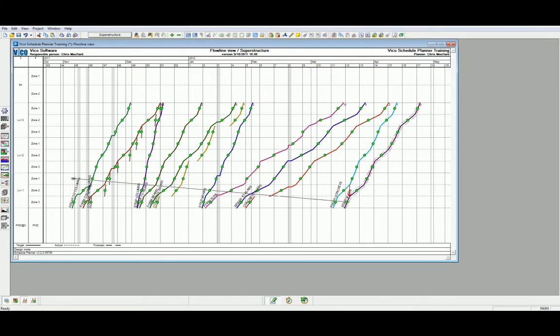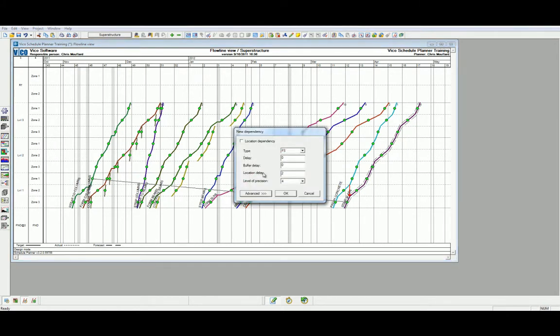In this case, we're going to do a level 2 dependency, selecting the floor above, a location delay of 2, clicking OK.